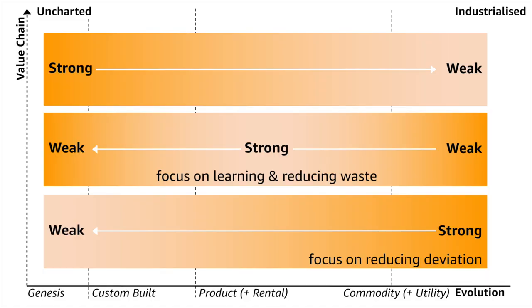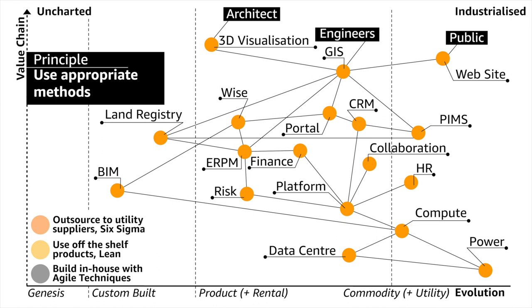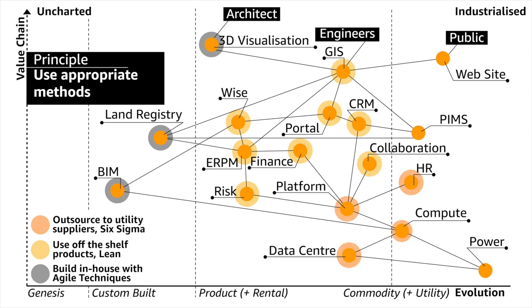Because of this you need to use different methods of management. Agile and extreme programming are very good on the left-hand side of the map because they allow for change — and what you need on the left is to reduce the cost of change, because change will happen; it's uncertain and uncharted. On the right-hand side you don't want change; you want to reduce deviation, which is why things like Six Sigma and outsourcing work well. In the middle you want to learn about the thing, which is why Lean, Scrum, and MVP — Minimal Viable Product — are ideal. So on the left-hand side we build in-house with agile techniques; in the middle we use off-the-shelf products or Lean; on the right-hand side we outsource with utility providers.